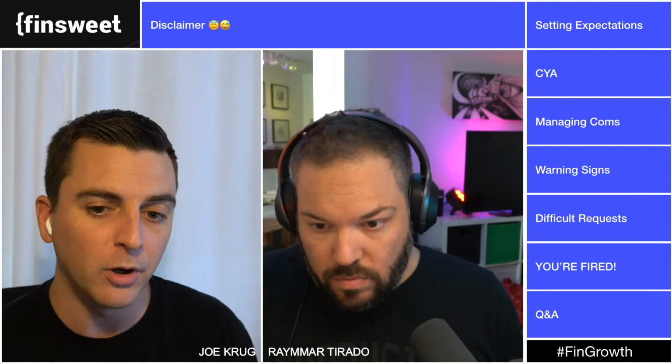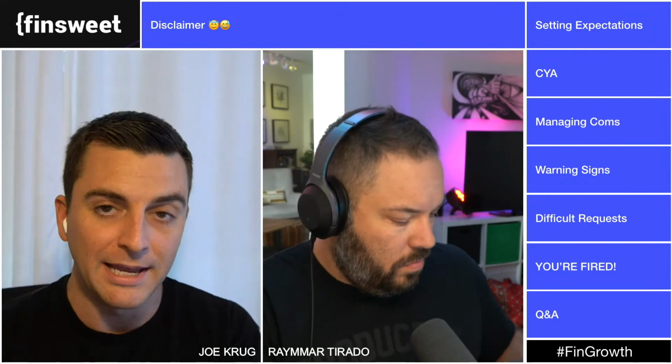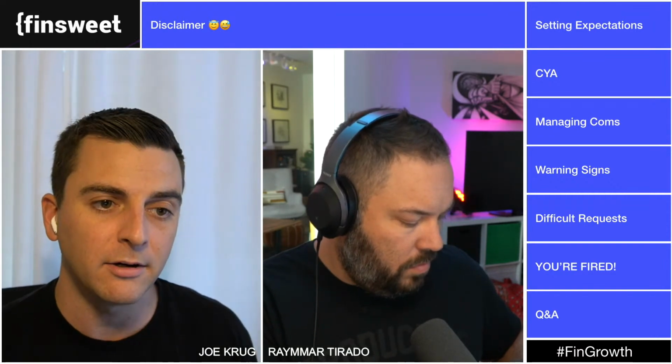So Joe, what's up on your side of the disclaimer here? Yeah, this should feel more like a last resort. You don't want to go into relationships thinking that you're going to use these tactics. This is only something that should be used if you really cannot move forward, if you don't see a future in the project or the company. That's when you use these. But like Reimar said, we want to avoid those. So how do we do that? We set the right expectations. We have to be really transparent about what we are going to do, what we want to do, what the client has to do, and how we all communicate. And this has to be done before the project starts. I like to make a list of all the things that we're going to do as a company and all the things that the client is going to do. That could be writing content, entering content, or any kind of tasks. Make it clear who is supposed to do what.